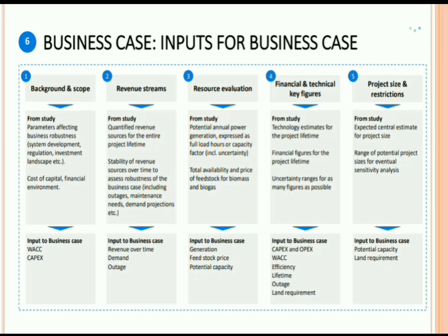Inputs to the business case study: from the resource evaluation, we will see the feedstock prices and potential capacities of that particular plant. From the financial and technical key figures, we'll see the efficiency, lifetime, outage, and land requirement for the particular plant or particular project. And in the project size and restriction, whatever the input we will get for the business case, that is potential capacity and land requirements. Means these are nothing but the different inputs that will be taken from different steps.